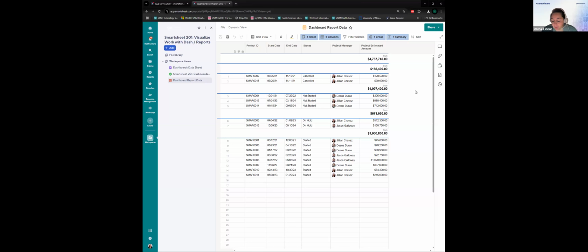So yeah, when we put it on the dashboard, you just have to adjust the last viewer setting. When we get to that part, we can touch on that. But otherwise, if you are sharing this report with someone, just sharing that link, and let's say you share the report with them, they still can't see the data in it. It's going to show up blank for them unless you share the underlying sheet. So the best method would be to put it on a dashboard or to publish it. Yeah, that's what I usually advise.